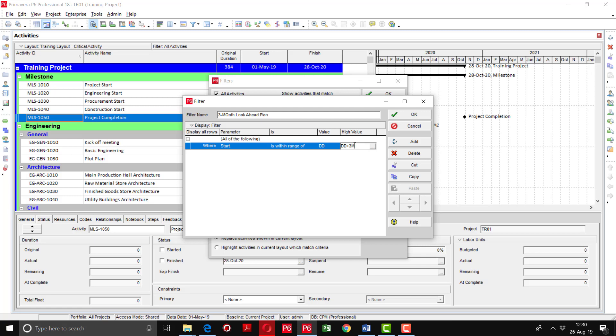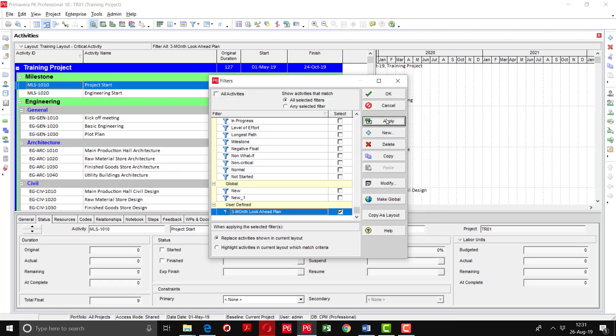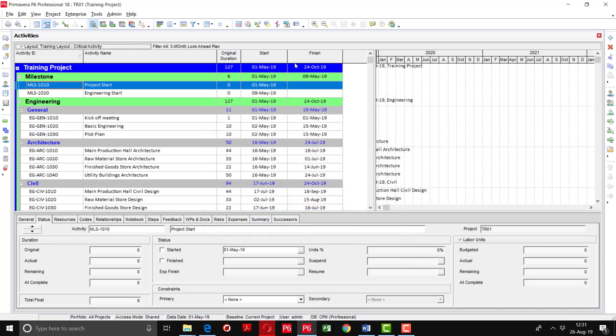The data date is the date on which the project is scheduled. Our data date and project start date are the same. We are going to see the activities within the three-month frame, so I am giving the range from data date to three months. I will press OK, apply, and you can see the three-month activities are showing here. You can also see the filter name displayed.